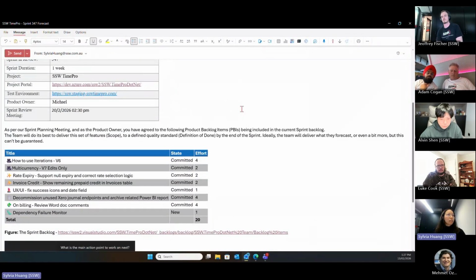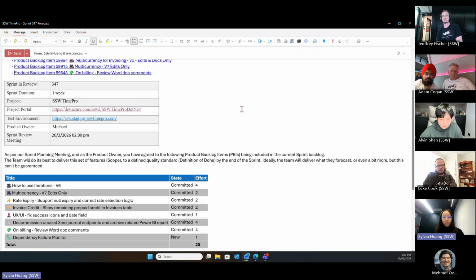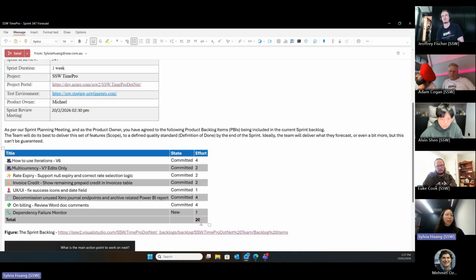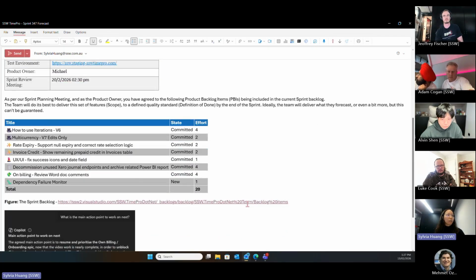And for the next sprint, because I will be absent, I will be on Sprint Festival. It will be mainly Jeffrey and Sam working for the sprint. So our capacity is reduced to 25. So we decide to bring in 20 points of effort of these PBIs.